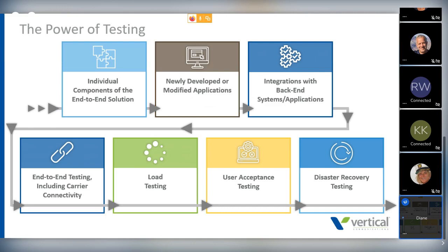Load testing. I have seen multiple times where things work on a onesie-twosie basis. The minute you add stress, the minute you add load to that, things break. That's why load testing is such an important part and often a step that's missed.